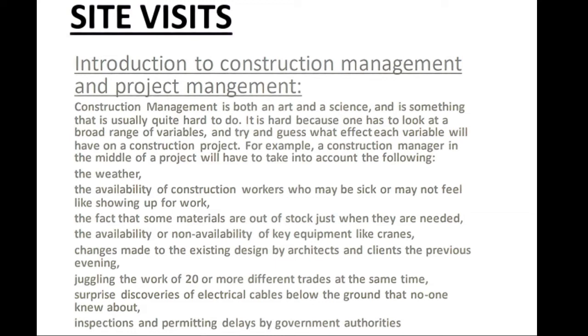For example, a construction manager in the middle of a project will have to take into account the following: the weather, the availability of construction workers who may be sick or may not feel like showing up for work, the fact that some materials are out of stock just when they are needed, the availability or non-availability of key equipment like cranes, changes made to the existing design by architects and clients the previous evening, juggling the work of 20 or more different trades at the same time, surprise discoveries of electrical cables in the ground that no one knew about, and inspections and delays by government authorities.